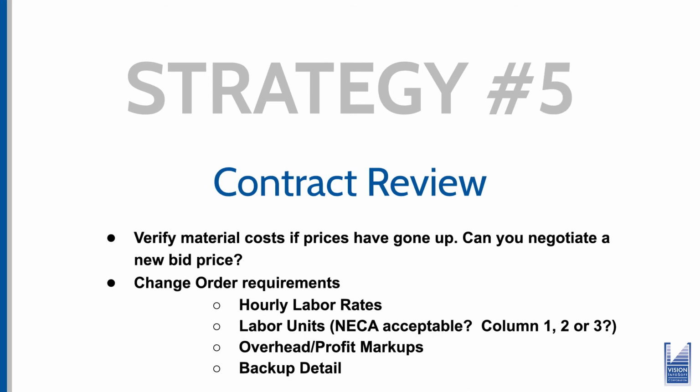So we're going to switch gears here a minute and talk about contract review. This is somewhat outside of the EBM environment, but one of the first things you want to check these days is to see if the material prices have gone up. Material prices have been on a pretty wild ride the last few months. If you're not qualifying your bid as good for a certain amount of time, you need to start doing that immediately. Typically it used to be you'd give 30 days that the bid was good for. Right now, that's probably still pretty risky.